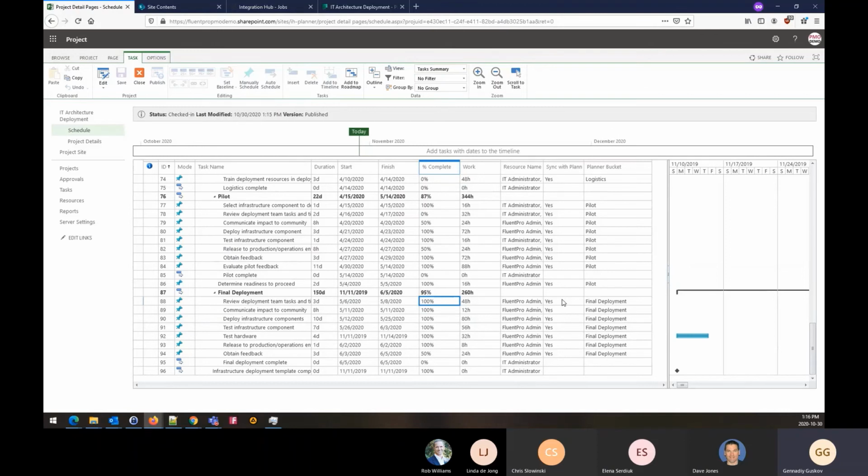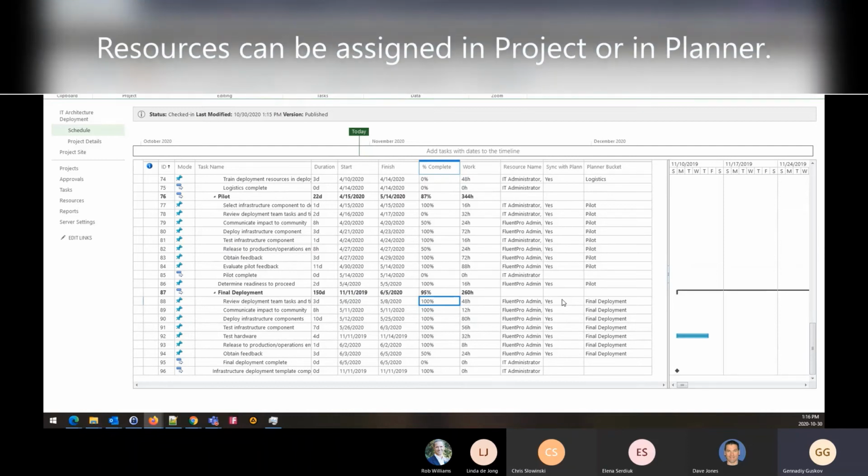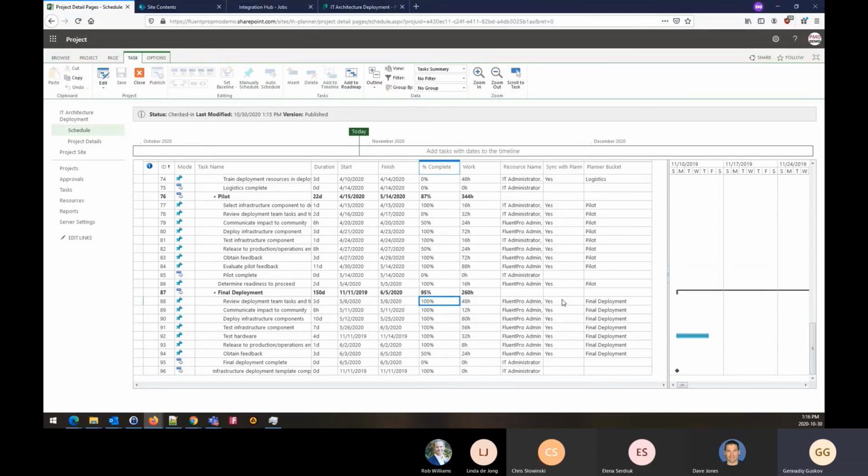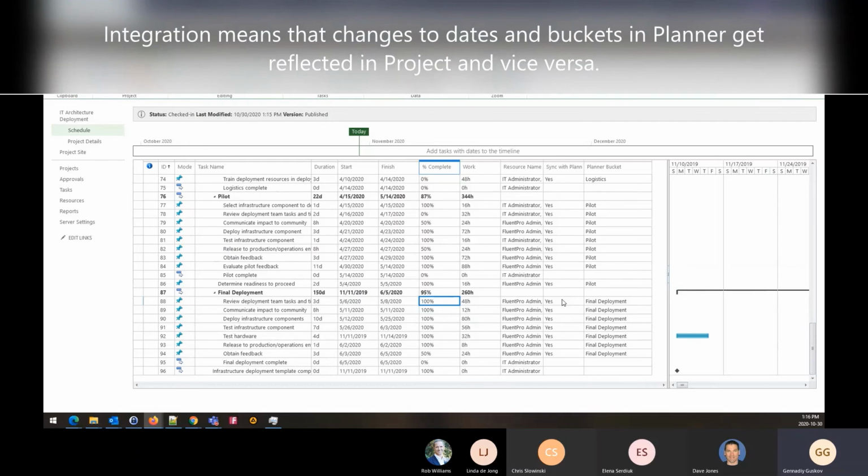The start date and due date can be altered by the team member in Planner, and then they can provide the completion mark, and the resource can be assigned to the task in Project Online, or it can be assigned to the task in Planner. That is because the assignments are synchronized in both directions. It doesn't really matter because there were equal signs on the mapping.